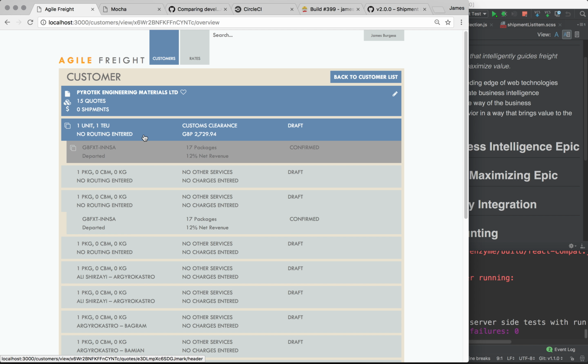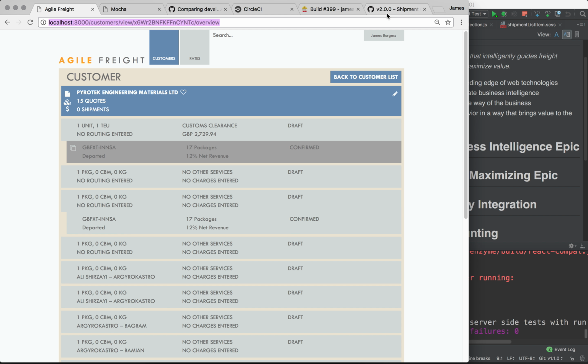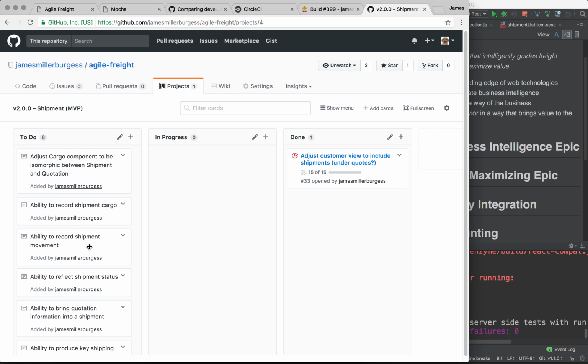And there may be insights revealed which end up changing the order here, or inserting new items here, or removing other items. The backlog is not fixed. It's a living artifact, so it can change at any time, with the knowledge that any changes are going to potentially impact timelines for release, and that's something that the product owner has to manage and communicate. So that's the first meeting that happens.